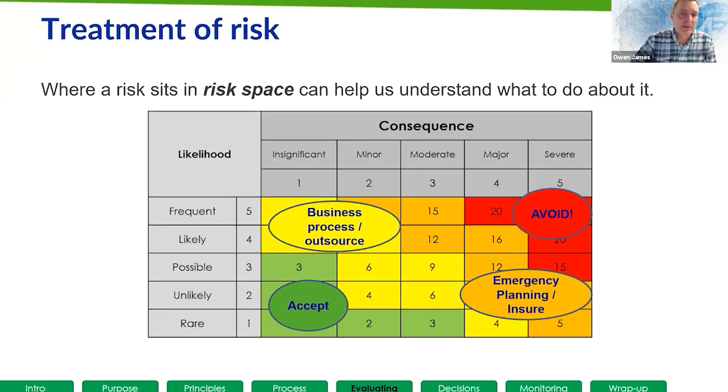And they may be business process solutions, or it may be that you say, look, our team just aren't geared up for this. We need to hire some professionals. We need to outsource this activity to another organization that is better able to manage risk. So you can see that depending upon where the risk sits in risk space, it can also help us to think about what type of solutions we can employ.